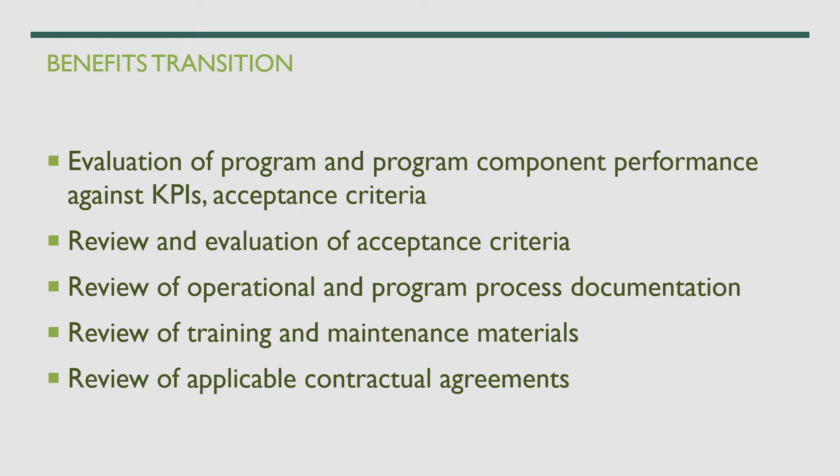Another set of activities involves evaluation of program and program component performance against KPIs and sustainment criteria. Before transitioning to operations, you provide them the KPIs, current performance levels, acceptance criteria, and what needs to be done to sustain it. You also review and evaluate the acceptance criteria, including any required changes, review of operational and program process documentation, review of training and maintenance materials, and review of applicable contractual agreements.